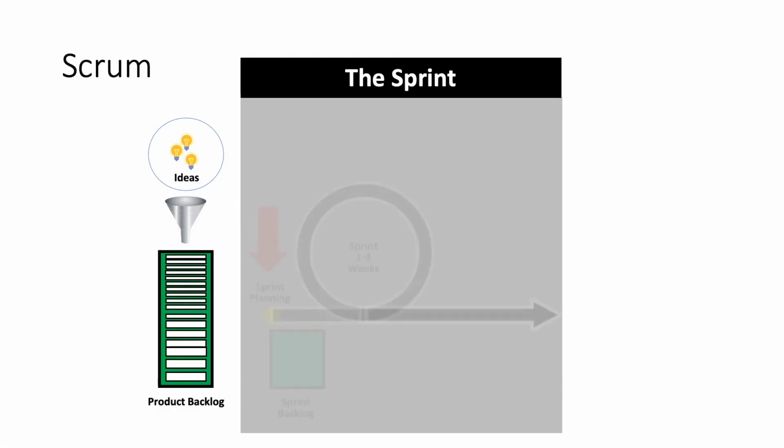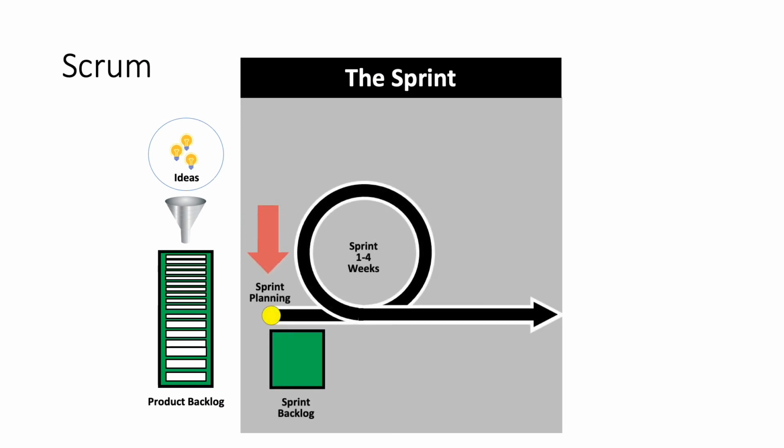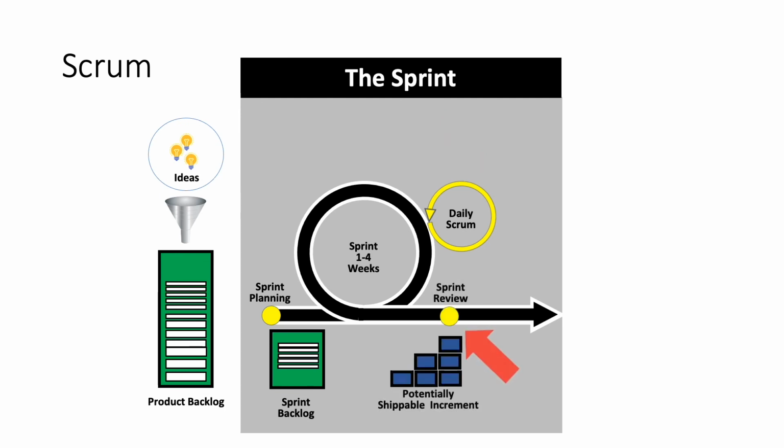In review, the first meeting in the sprint is called sprint planning. The team pulls user stories onto their sprint backlog. They meet daily at the daily scrum to plan on what they will do that day to achieve the sprint goal. There is also a time where they share impediments and other concerns.